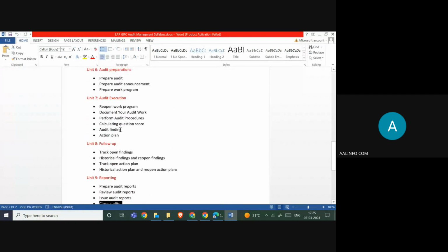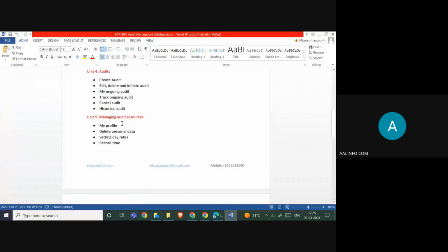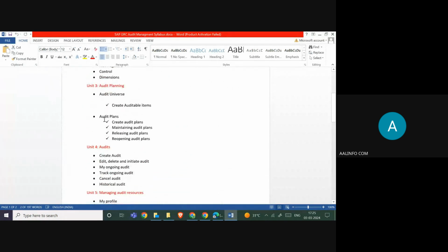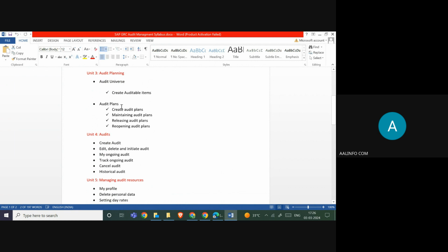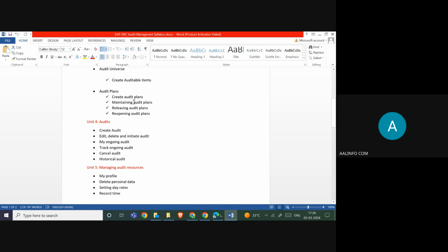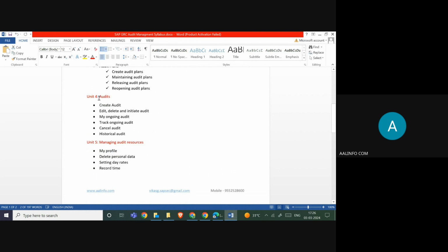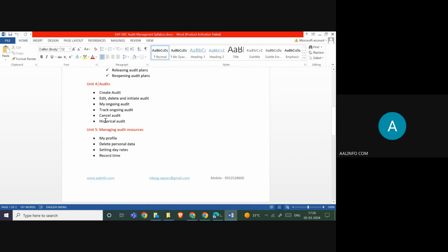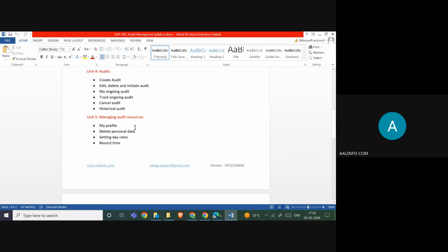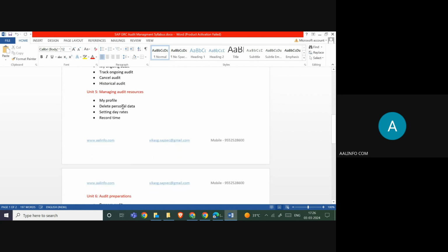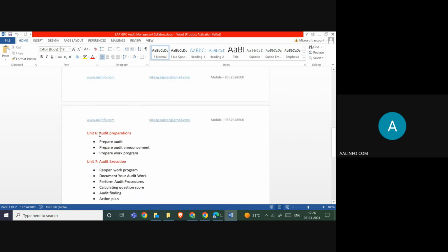In this, these are the main phases. One is your audit preparation or planning phase. First is the planning phase. In the planning phase, you will capture the auditable items, especially that you can consider. Once you consider all the auditable items, the dates, the effort, and the people, you send this audit plan to your audit manager for approval. Once the audit manager approves, he can check all the timing, and who are the persons who will be coming into this audit effort. Then from here you send this approval, and from here you can prepare.